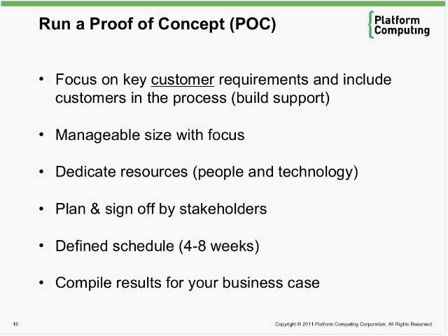Also try to have dedicated resources for this as a new test, both hardware and system resources, but also a team, maybe a small team, to work on these projects through the duration of the proof of concept, to make sure that people are aligned on the user side as well as the IT side as well as the executive side, and define a project schedule. Typically what we found is that if you are reasonably well prepared, it takes about 4 weeks, maybe up to 2 months. It shouldn't be too long. If it's too long, it may mean you're not ready, or it's too complicated, or you're trying to do too many things. So be careful and focused.